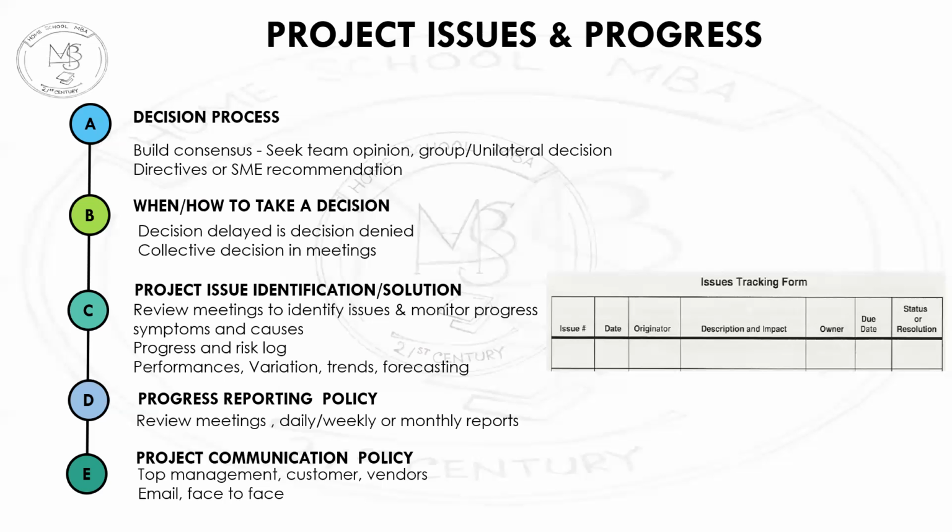The most important thing in progress review meetings is that you issue the agenda before time to all those team members who are involved in the project, and you invite them for review meetings. Instead of you talking, you let them talk, and you let them explain their progress, their achievements, and their failures.